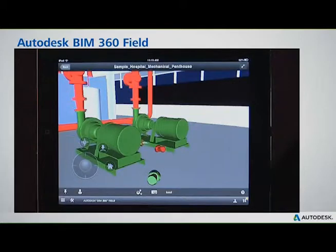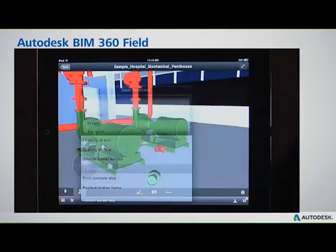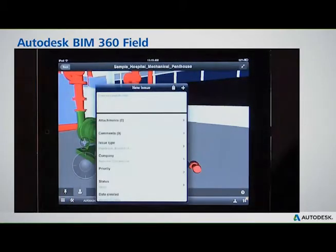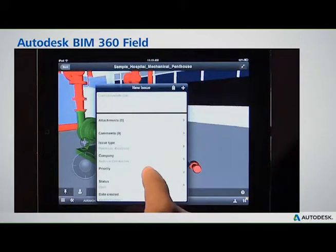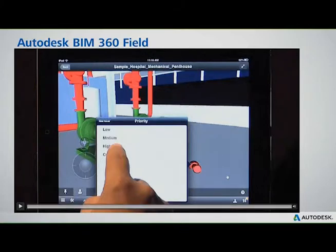You've walked up to a pump, you've scanned it, and BIM 360 has made the connection for you. You're now in the same location virtually as you are physically, and you are adding information. In this case, you're creating an issue. This issue is going to go to Anderson Construction. Anderson Construction is going to get a one-click link back to the specific location in the model so that he knows exactly where this issue is and what needs to be done to address it.